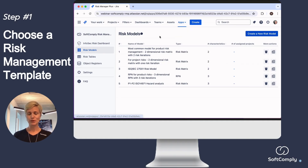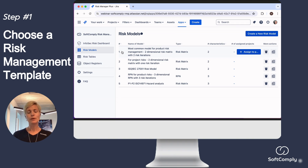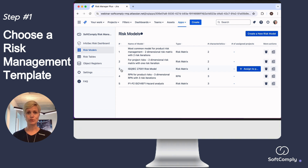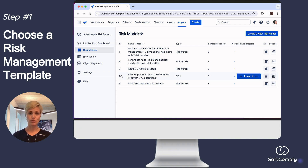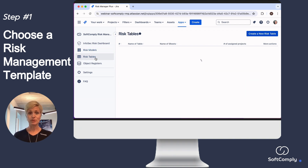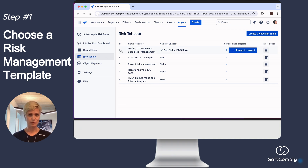First, you can choose a risk model and risk register template that are closest to your current risk model and risk register. For building your risk model, you can choose between risk matrix or risk prioritization number — otherwise known as risk score — based risk model templates. For building a risk register, you can pick a risk register template for your information security, product, or project risk management.